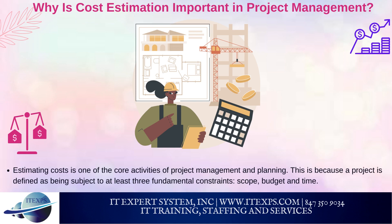Therefore, budget determination and assignment require some stakeholder involvement, communication and, in many cases, their approval. In addition, cost estimates are input parameters for the earned value and variance analyses as well as forecasting of project costs.